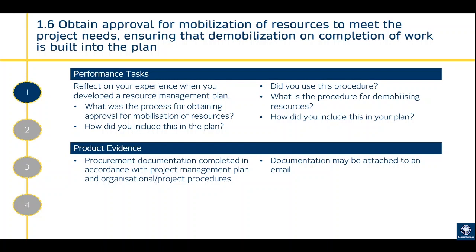Key part of this is to ensure that once the project's completed, or once that activity is completed, you no longer need that resource, that equipment, or those people. There is a plan on what to do with them once the project's finished using them. So there's demobilisation upon completion of work built into the plan, so ensure you can evidence that as well.